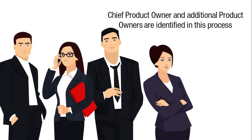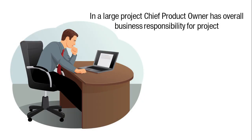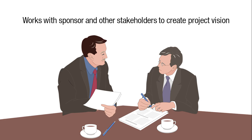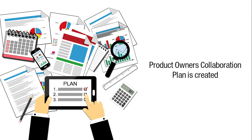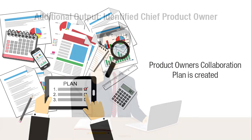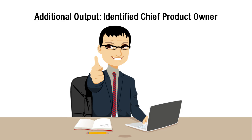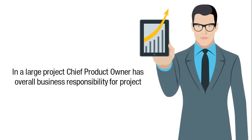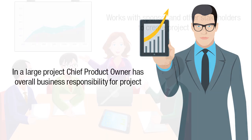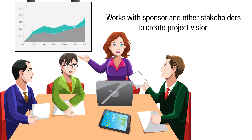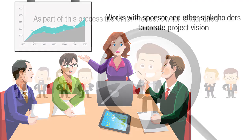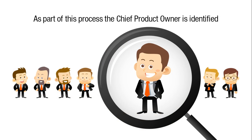A chief product owner and additional product owners are identified in the Create Project Vision process. In a large project, the chief product owner has the overall business responsibility for the project and works with the sponsor and other business stakeholders to create the project vision. Additionally, the product owner's collaboration plan is created. The chief product owner is identified as an additional output, and the identified product owner is an updated output, since in a large project there are multiple product owners who also need to be identified in this process.